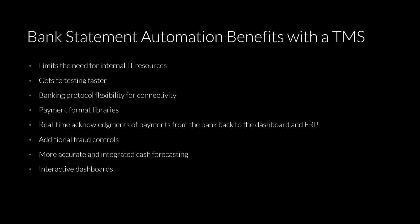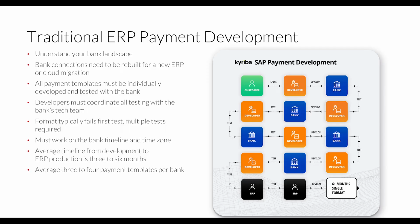During an ERP project, coordination of the development and testing phases is imperative to meet your project milestones and go live dates. Imagine the frustration that your team and business overall would have if you successfully complete your UAT testing of your treasury functions with the bank, only to find out that the banks that you do business with not only were not able to put your files and processes into their production environment until after your planned go live, or that they forget to promote the solution that you tested in UAT into their production environment. Personally, I've seen both of these scenarios happen at a go live.